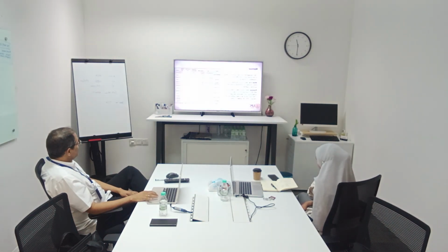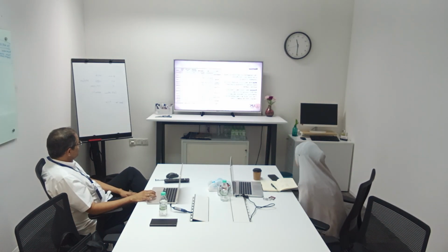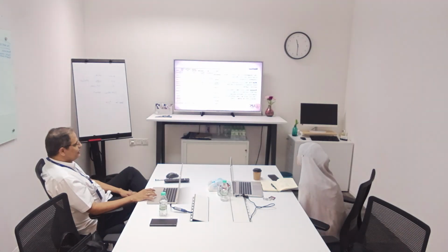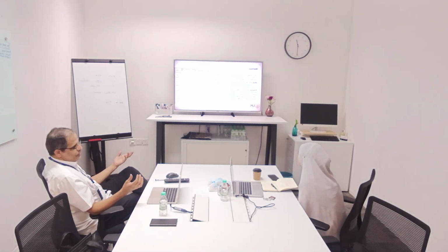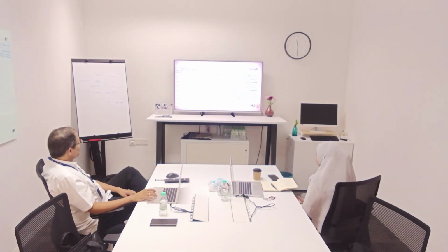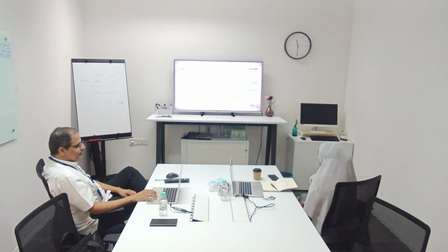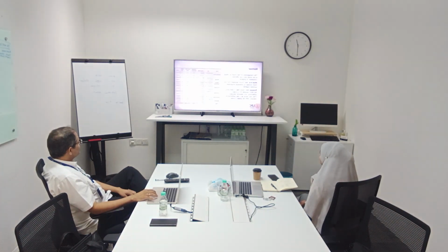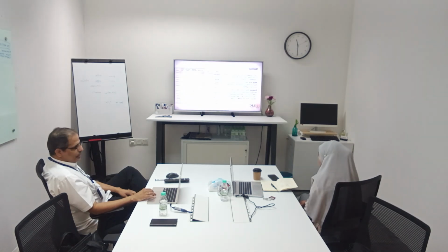For example, here the task is a feasibility study. This is the phase, then the market analysis for the feasibility study and technical feasibility. The responsible parties here are business analysts and engineers. Estimated man hours are 100 and 200. But for the actual, instead of 100 they spent 110. So now we have run out of costs, not because of our estimation, but because these people don't do the job. Then you mark it as complete, ongoing, and so on.